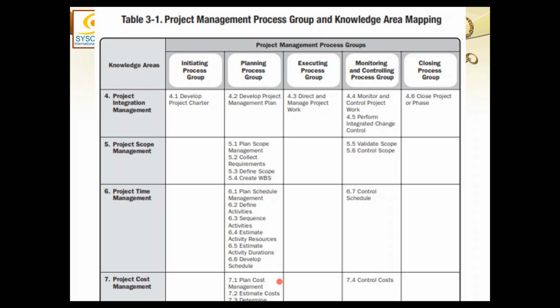The reason is that everything else which happens in a project, like communication, like procurement, if there is a change in any one of them, would actually impact one of these three objectives: scope, time, or cost. So if I can somehow control the baselines of these three items, I can control the whole project.